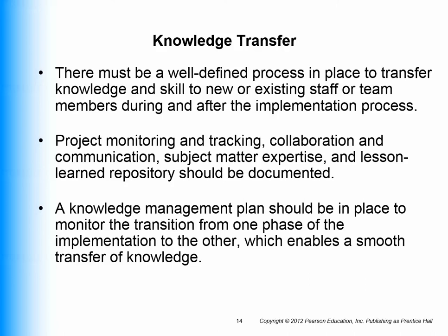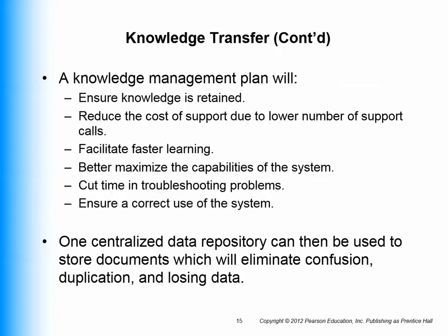Tacit knowledge is the knowledge in everyone's head, and if a key employee leaves the organization, tacit knowledge leaves with the employee. Explicit knowledge is documented knowledge. So your challenge as an organization is to tap the knowledge that you have in people's heads, document it, and share it so the entire organization becomes knowledgeable, not just specific individuals. And this is really essential during an ERP implementation and cutover.